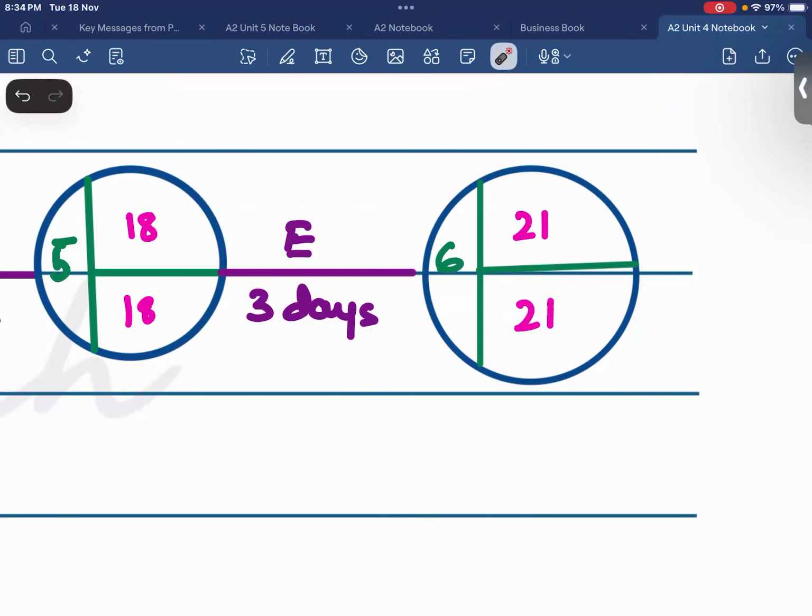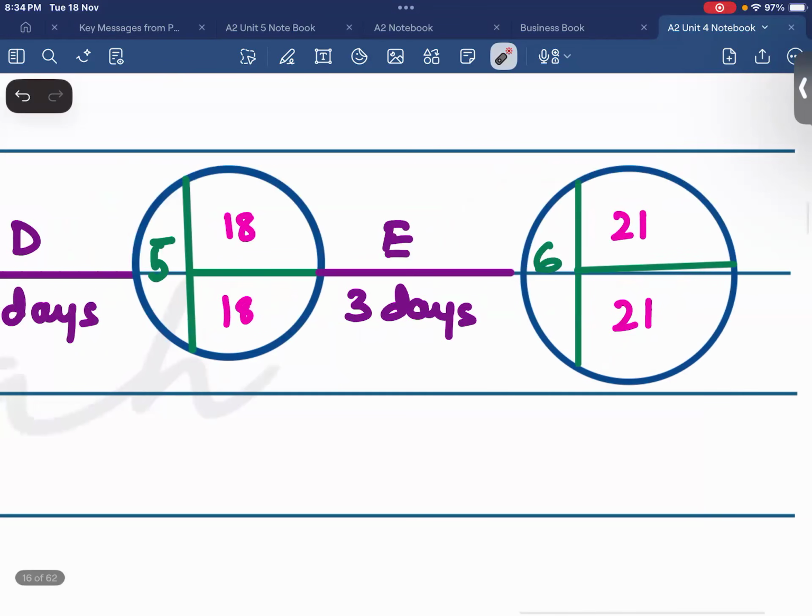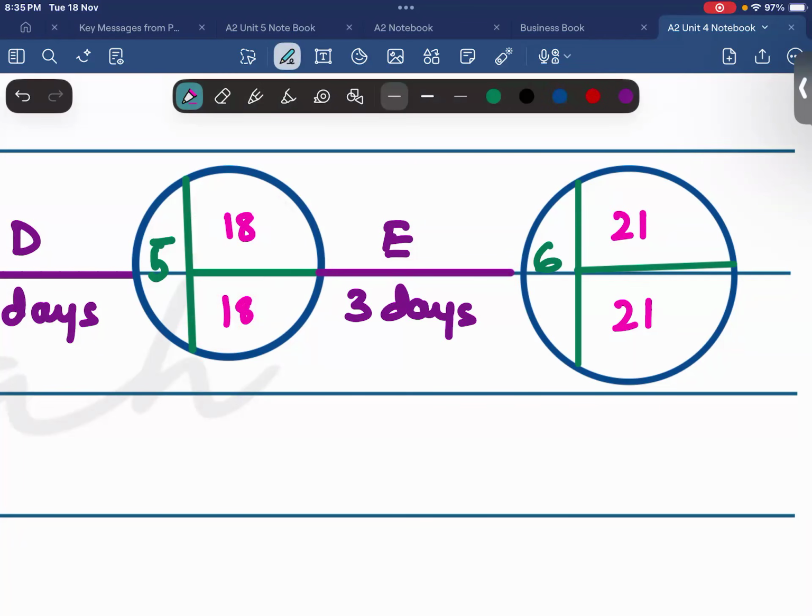Now one more thing that you have to do while you're calculating LFT is you have to see that when you're coming back from the route which is giving you the same LFT as EST, like I came from route E, this route is giving me 18, which is equal to my EST. So what I have to simply do is I have to mark this activity. Why do we have to mark this activity? I will tell you later on.